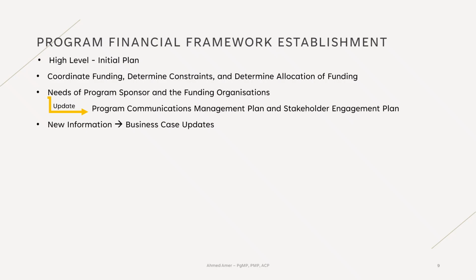Unlike projects where costs and deliverables happen close together, program costs come much earlier, often years before benefits show up. That creates a natural gap. We are spending money long before we see any return. The goal of program financing is to secure the funds needed to bridge that gap and cover what is often a large negative cash balance during development. This is one of the biggest challenges in program financing.